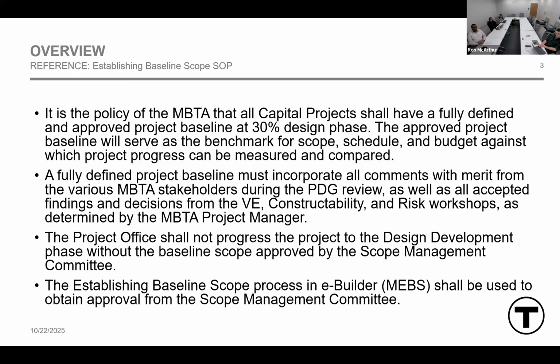A couple of years ago, 23 rather, we decided to just establish a draw line and set a baseline for projects wherever they were in flight. Now we want to be more realistic in how we set these baselines. And so at the 30% of design, we will pause the project momentarily to allow the baseline and process.